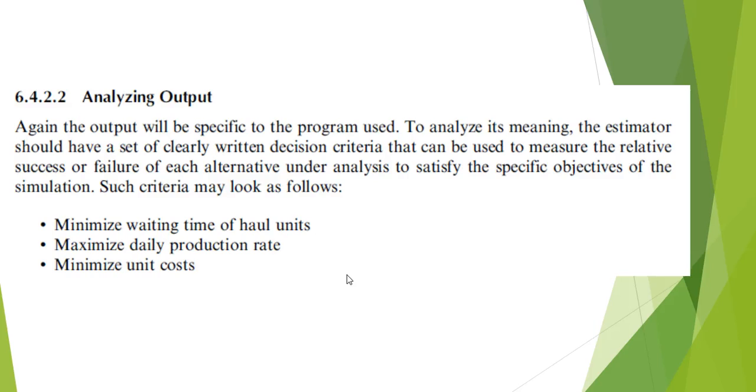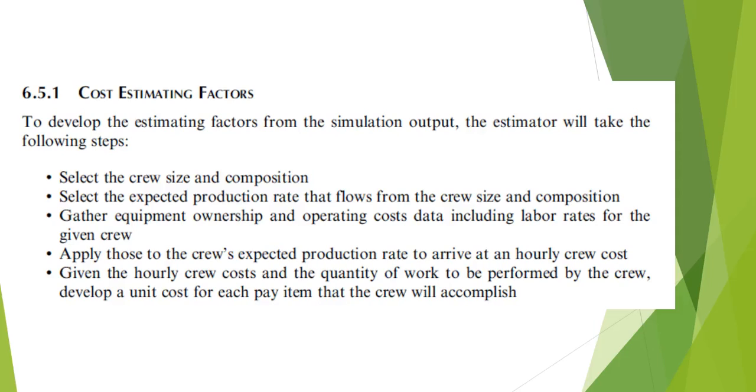And it may be minimum waiting times of haul units or maximum daily production rate or minimize unit costs. But before you get into the analysis, you want to be able to define what your target is so that you know what to compare and make a determination of whether the situation you've modeled makes sense, and also whether it's a successful simulation or not, or whether it's being accurate for you.